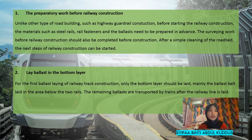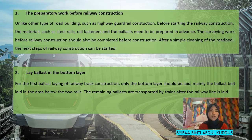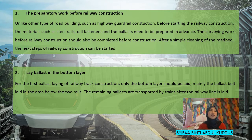Next is the railway construction process, which we have concluded into six steps. The first step is preparatory work before railway construction. Unlike other types of road building such as highway guardrail construction, before we start, the materials such as steel rails, rail fasteners, and ballast need to be prepared in advance. The surveying work should also be completed before construction. After a simple cleaning of the road pad, the next step can begin.